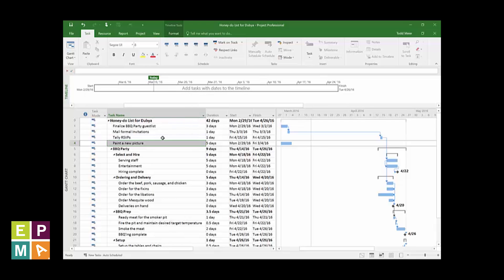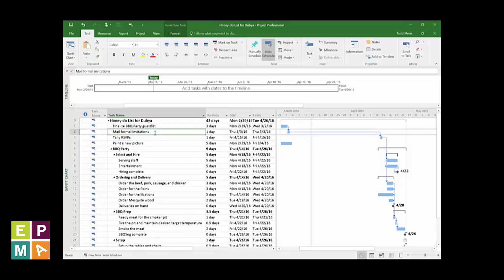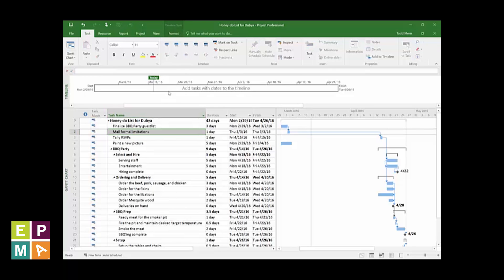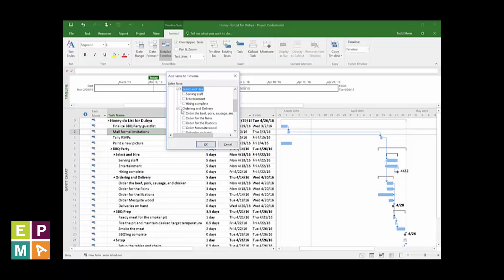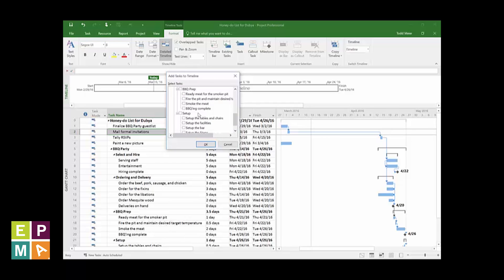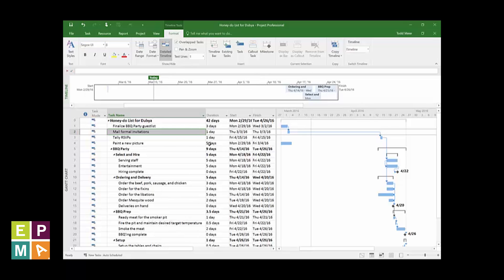For example, I want to make my task Mail Formal Invitations visible. So I'll first click on my timeline, which auto-detects the Timeline Tools Format tab. Then, in the Insert section of the ribbon, I click on the Existing Tasks. Pretty nifty how the pop-up shows me my tasks. It keeps them in the outline order, sure helps me pick them. I'll select Mail Formal Invitations. Then I'll select some Summary Tasks: Select and Hire, Ordering and Delivery, Barbecue Prep, and Set Up. And I'll click OK.